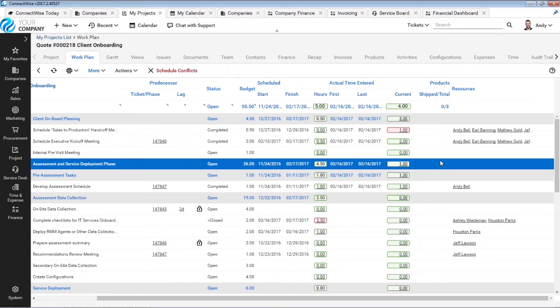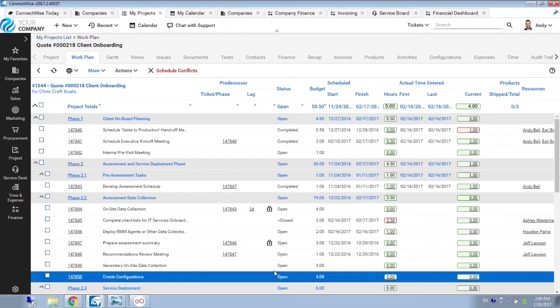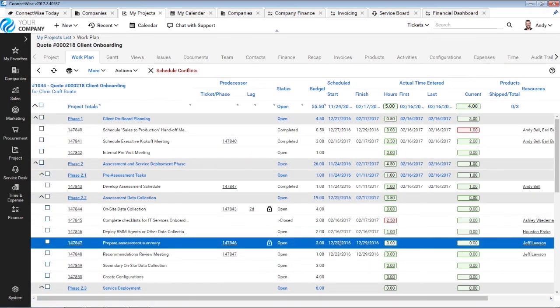And without just having to come in each time to see if maybe we're on target of actual hours versus budgeted, I do have the ability to automatically be notified as we hit certain thresholds of that project. So maybe at 80% and then again at 90%, I get notified, or I have a report that gets emailed to me so I can keep on track with the projects that are out there.